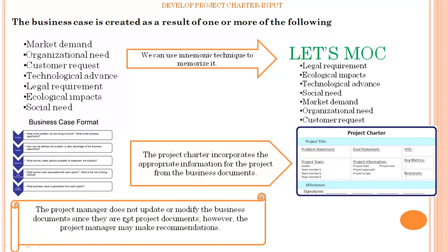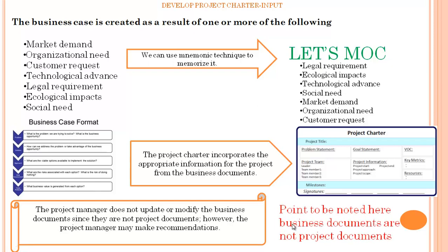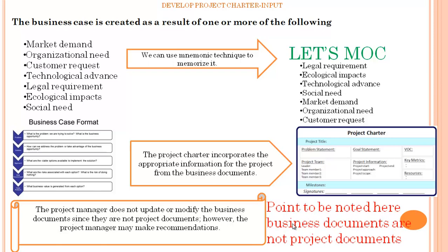The project manager does not update or modify the business documents since they are not project documents. However, the project manager may make recommendations. Here, the point to be noted: business documents are not project documents.